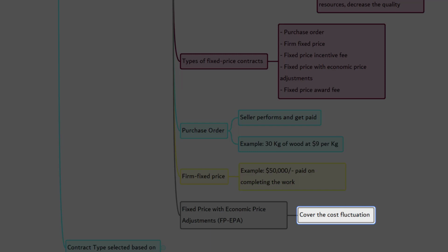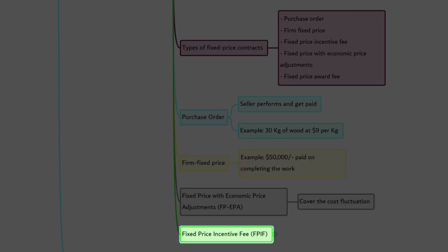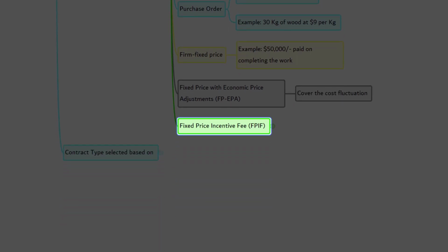But remember, here you are allowing the vendor to increase the cost of concrete block pertaining to steel portion only. Steel is one of the key input, but not the only input for making concrete block. So the vendor can play around the cost that is pertaining to the steel alone, not for the entire concrete block.